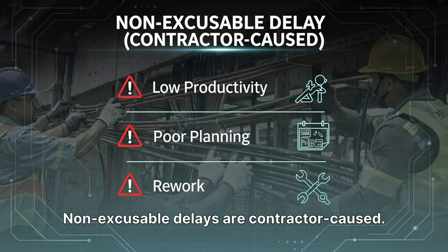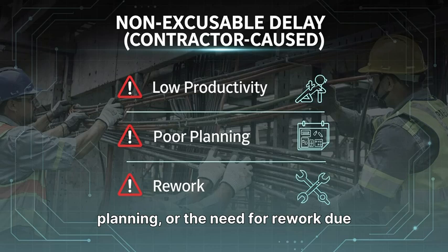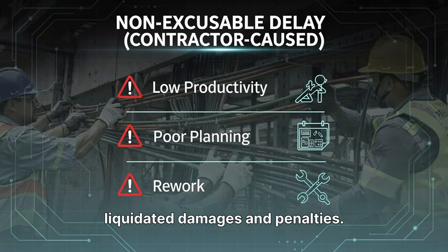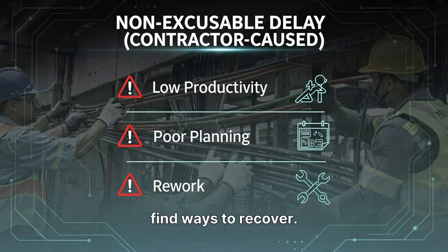Non-excusable delays are contractor-caused. These include low labor productivity, poor internal planning, or the need for rework due to quality failures. These delays carry the heavy risk of liquidated damages and penalties. The contractor must own these impacts and find ways to recover.